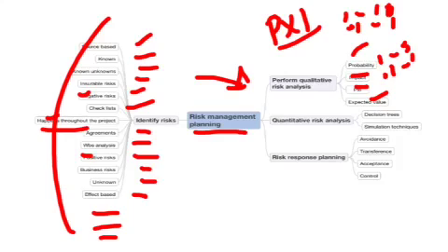So this is again not a standard. It could vary from company to company. So once we apply this threshold to the P into I, or the expected value or the expected monetary value, then we can filter out a segment of the risk which really needs attention immediately. So those risks will undergo quantitative risk analysis. There we use techniques like decision trees, simulation techniques.